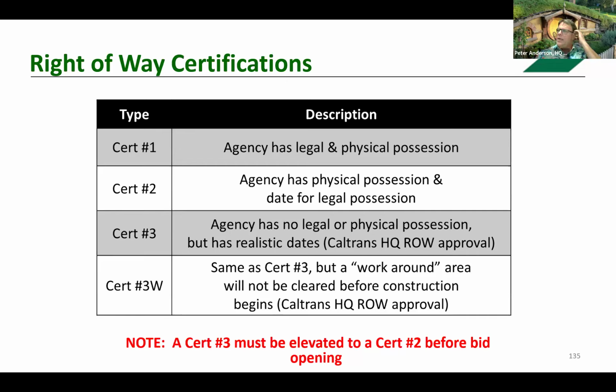So during the PE phase, the NEPA document will be approved during that time phase before it goes into final design. We here at Caltrans, we do not see that phase generally. We'll get it when it goes to construction. That will be a new phase, and therefore it needs to be considered to do a revalidation.